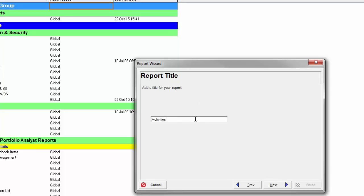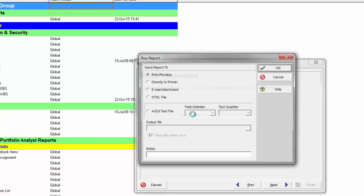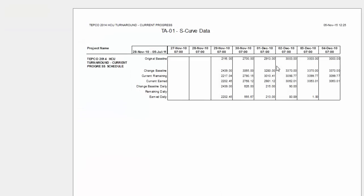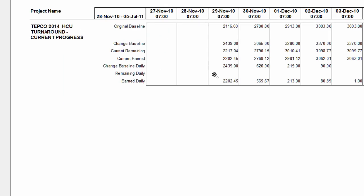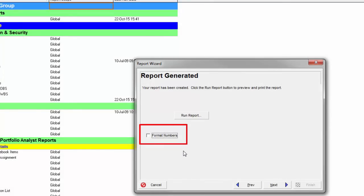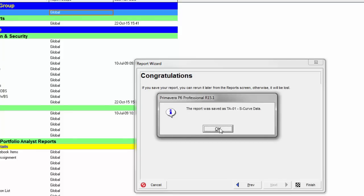I click Next and give the report a title: 'TA-01 S-curve data.' I also turn off decimals and turn off format numbers — that way if someone else runs this report with the hours label turned on in their user preferences, the 'H' label won't come over into Excel. If the 'H' shows up in each cell, Excel treats it as text rather than a number, which would break our graph. Hit Next, save the report, and finish.